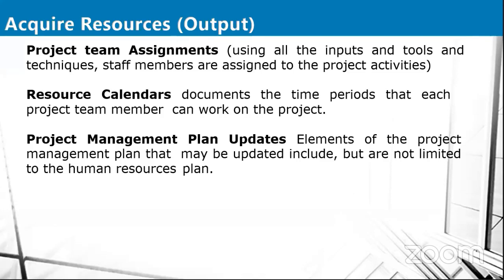Then, of course, you're going to have the resource calendar, the document that shows you the time period for each team member, the time period that the team member can work. In the resource calendar, is the person going to work from Monday to Friday, or from Monday to Sunday? Is the person going to work during the public holiday, or not? What time is the person going to work? Is it from 8 in the morning to 5 p.m., or from 8 to 2 p.m. each day? So you assign all those criteria to each team member to know that, okay, this is the time you're going to do those things.